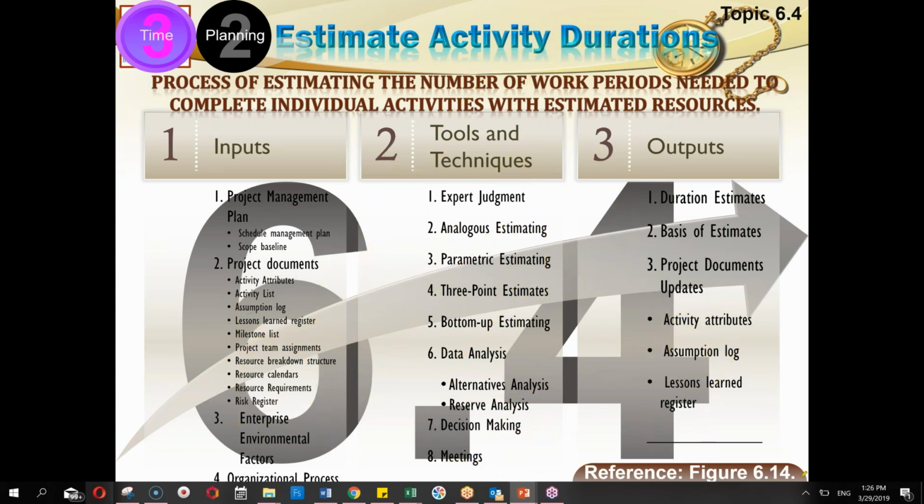So this was the 3-point estimate. Then is the bottom-up estimate. The most detailed estimate is bottom-up estimate. You estimate everything at the activity level, then sum it up. Those activities which are part of one work package, I will sum all these activities and find the estimate for the work package. But naturally, I will keep activity margin in it.